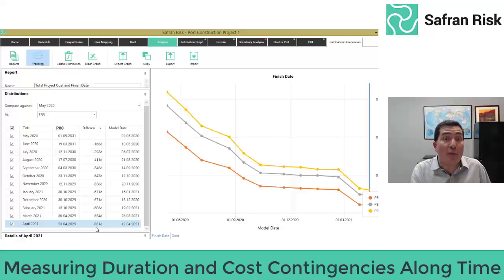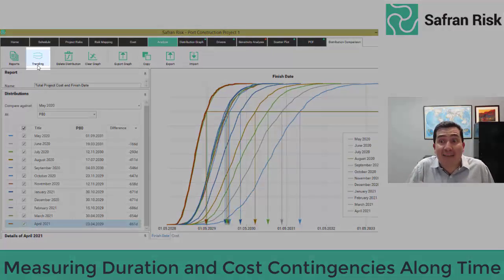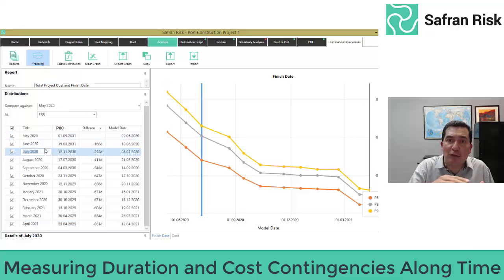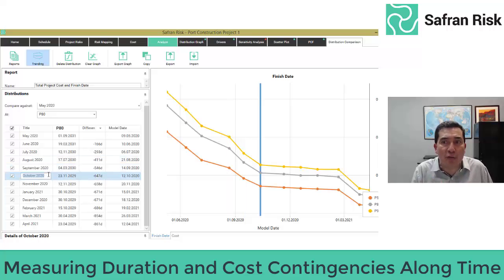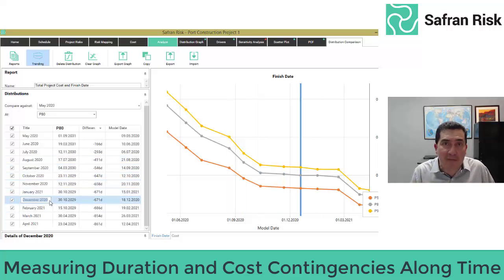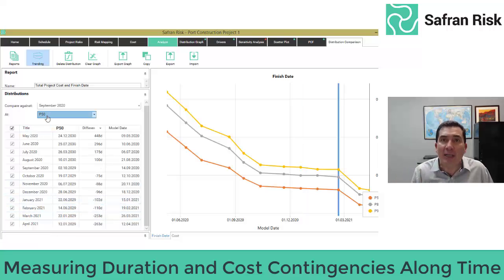You can either view this information on overlaid S-shaped curves, one for each month, or view it as a trend over time, which should allow you to see how risks and uncertainties normally tend to reduce over time. We see this as P50 and P80 lines tend to get closer to each other as time goes by.